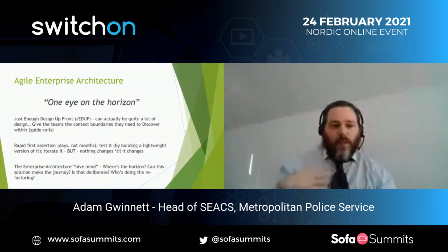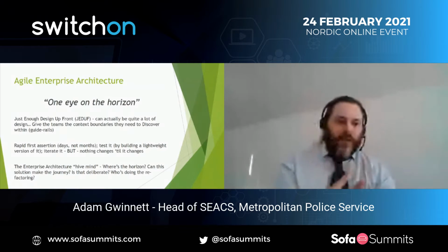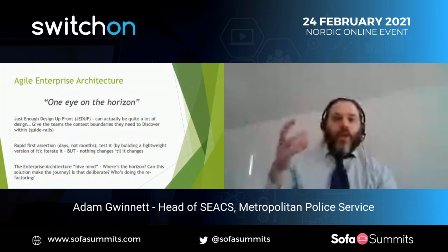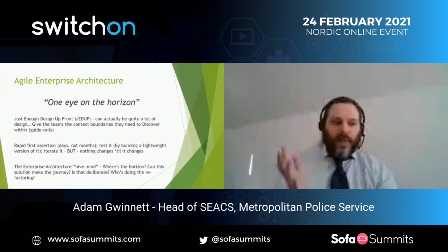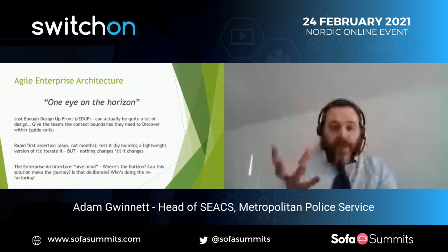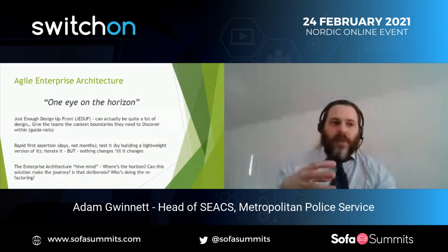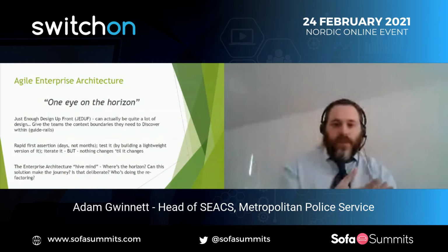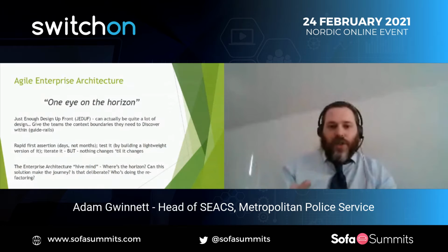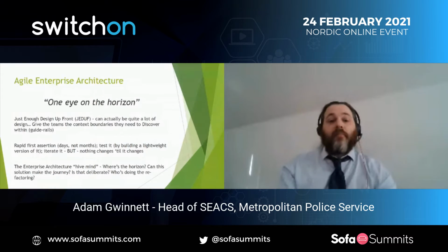So one of our key aspects was working with the service owners to help them understand whether the solutions or prototypes they'd built could evolve into that fully scaled solution, or whether some aspect of it was disposable, there to prove the model and prove out the design, and you then had to build something else. We found that a lot of those dialogues were happening, but certainly the first few times that service owners encountered having to dispose of a product to then build the scaled version, it came as quite a shock. They hadn't had that cognizant and explicit dialogue around the fact that the solution they built wasn't the final result. So what we did through the EA practice was drive in all of those.